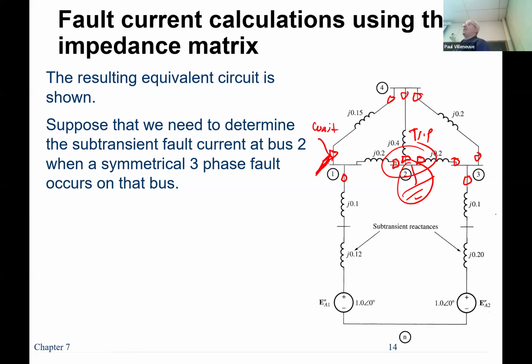But I had to be pretty comfortable, because if I told them to energize it again, or allowed them to energize it again, and then it burns up, this was 20-something years ago. That was probably $2 million and an 8-month lead time. So if I hadn't told them not to, I would have had to go ahead and get oil tests done. I would have had to do a bunch of tests. It would have been at least a week that they would have completely stopped the startup process, because I said, nope, you can't energize it.